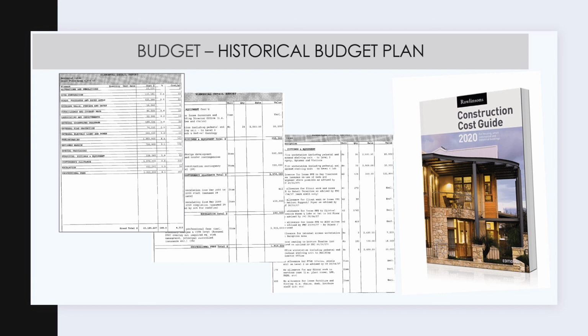that could cause trade-offs to remain within the budget. Documents that support maintaining control on budget compliance are cost management plans that describe how project costs will be structured into the budget, resource management plans to provide information on rates and other foreseen costs that are necessary to estimate the overall project budget and budget performance, a scope baseline, assumption logs, lessons learned registers, which can also be shared with other sub-projects to assist them in identifying issues that they may encounter, and a risk register to be updated when appropriate risk responses are chosen and agreed upon during any changes to budget and key milestone assumptions.